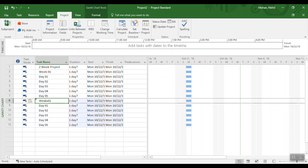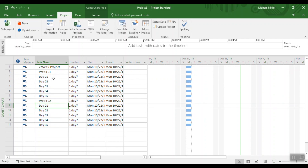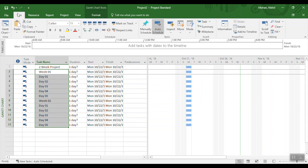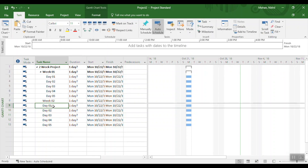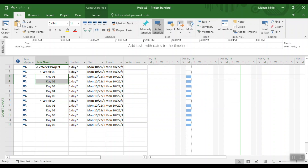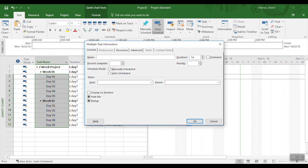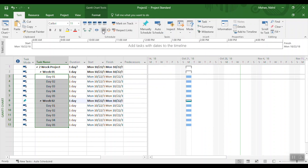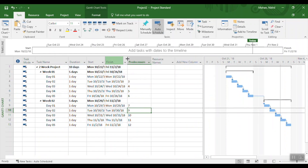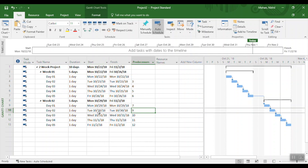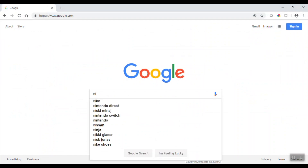I'm going to copy those five days for the second week, paste them, and call the second week Week 2 — all part of the two-week project. I'll indent the tasks so the first five days go under Week 1 and the second five days go under Week 2. All tasks have a one-day duration. I'll select all, go to Information, set duration to one day, then link all tasks sequentially.